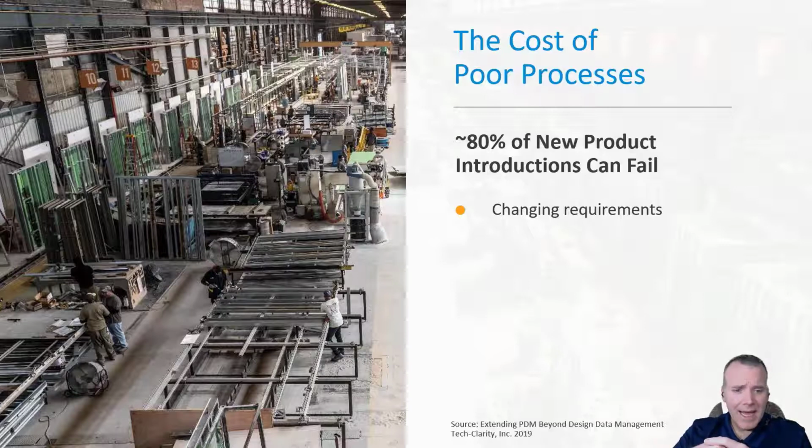And the issue in that case really was the customer had hard requirements. We did not properly capture those requirements for a long period of time. And when those requirements finally became clear, literally a year worth of work was wasted because the direction we went and the tooling we had was never going to lead to something that would meet those requirements. So properly capturing requirements and reacting to changes in requirements are vital to delivering a quality product.